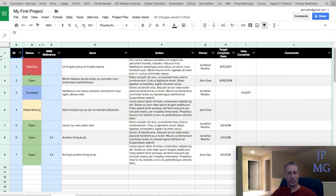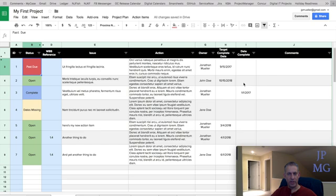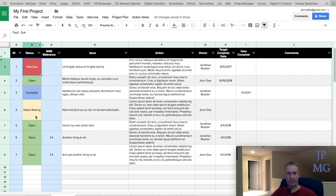You notice a few things. First of all, status is automatically calculated. And there's really four values. Past due means I don't have a date complete and the target complete date was before today. Open means target complete dates in the future and the date complete is not filled out and those appear as green. Anything with a complete date shows up as blue and will indicate complete. And anything where we don't have a date and it's not complete will show up as yellow or date missing.